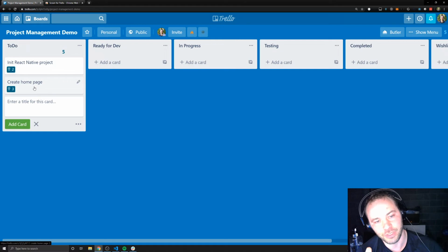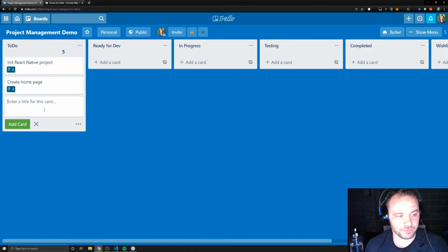So I try never to go above 8. And if it's something I think is going to be more than 8, I try to break it down into smaller tasks to make it easier to estimate. This is a type of system that is hard to get right at first when you're estimating, but the more you use it, the more accurate your estimates will get.